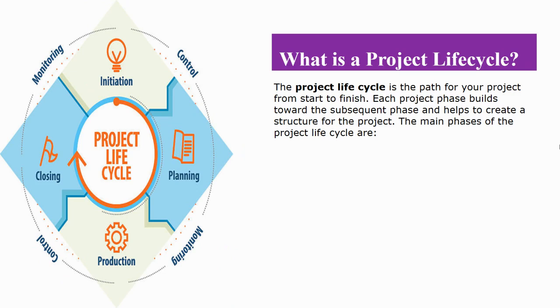As you can see on the screen, you see a sample of the project life cycle, which shows the phases through which the project should go in order to be implemented. The first phase of the project life cycle is project initiation. In this phase, we design a project, we agree on what the project wants to achieve, we understand the problem, and we get to approve the project.